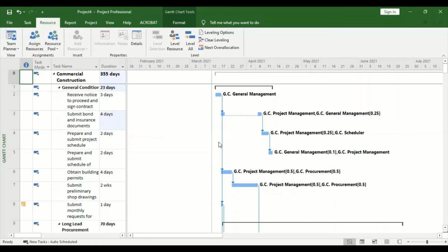Yeah, because sometimes when you overexhaust the resources, you may incur different risks. Maybe if it's a person, they may get sick, then that means the next activities will not be involved, and that can delay the entire project. So you want to have a look at how long it is going to take if I just work efficiently without over utilizing or exhausting my resources. Yeah. So that is the resource level.